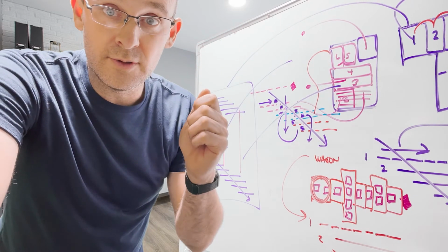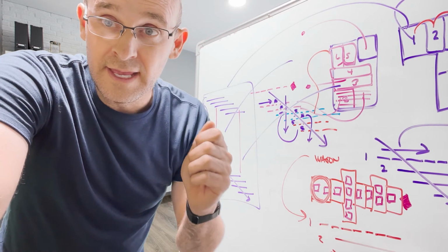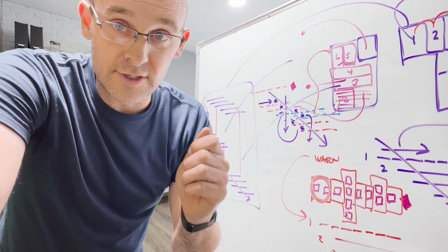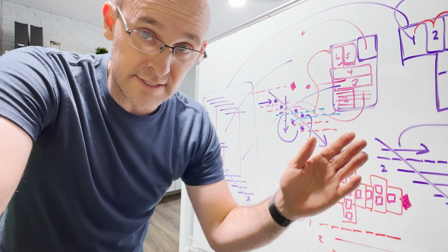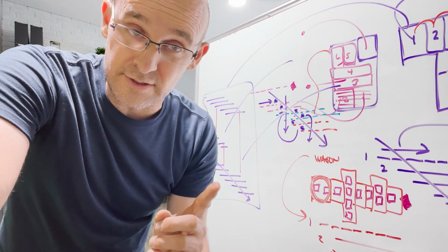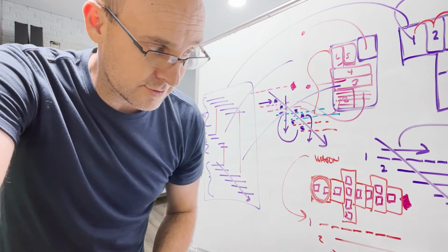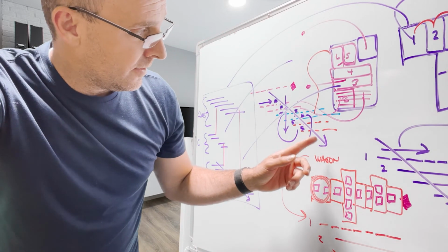We want to put anything that's typical and rhythmic on a rhythm and make it standard and steady so that we can focus on the areas that are not steady, that are not standard, and focus on the inevitable variation and not the non-inevitable variation.